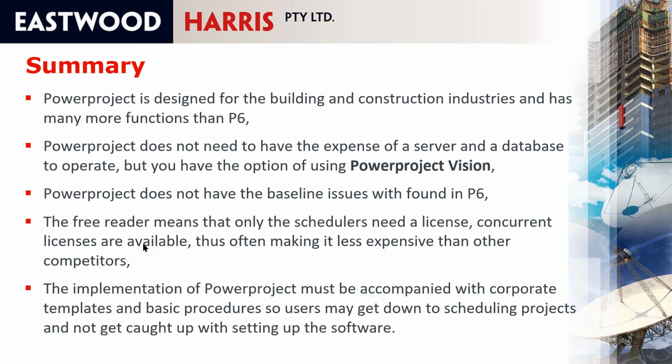expensive than other competitors. And the implementation of Powerproject must be accompanied with corporate templates and basic procedures so that users may get down to scheduling projects, not get caught up with setting up the software, because there are a lot more functions in Powerproject than the other products, and you must set up your templates and procedures so that people can get down to scheduling and not worry about the additional functions they're not using.